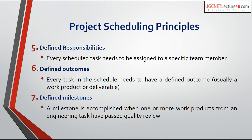Defined responsibilities means every task in the schedule needs to be assigned to a specific team member. For example, requirement analysis is given to the analyst, and coding is given to the developers. Defined outcomes means every task in the schedule needs to have a defined outcome — a deliverable. For example, the deliverable of the requirement analysis activity is the SRS document.